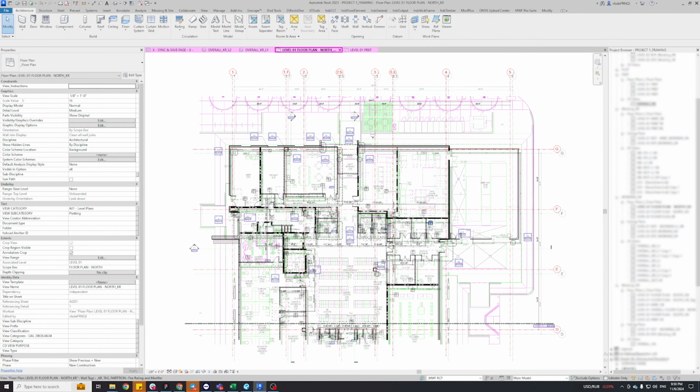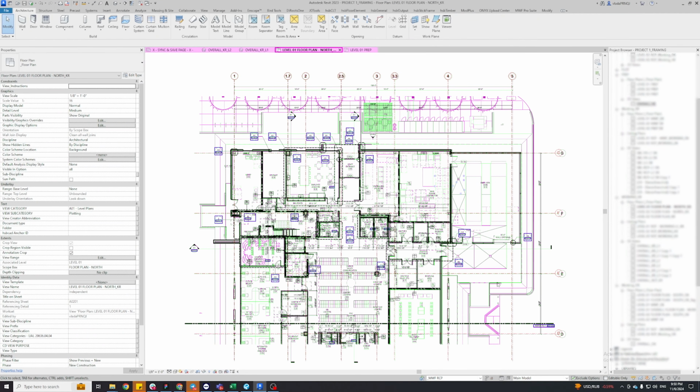The first step is to ensure that everything is in accordance with the design. Sometimes, the architectural model is outdated compared to the drawing set. Therefore, we must go over the model and ensure that all grid lines are accurately placed and that the types and location of walls, doors and windows match the drawing set. The issue can occur when the model is more up-to-date than the contract documents, in which case we must contact the project manager and choose which should be followed, model or drawings.